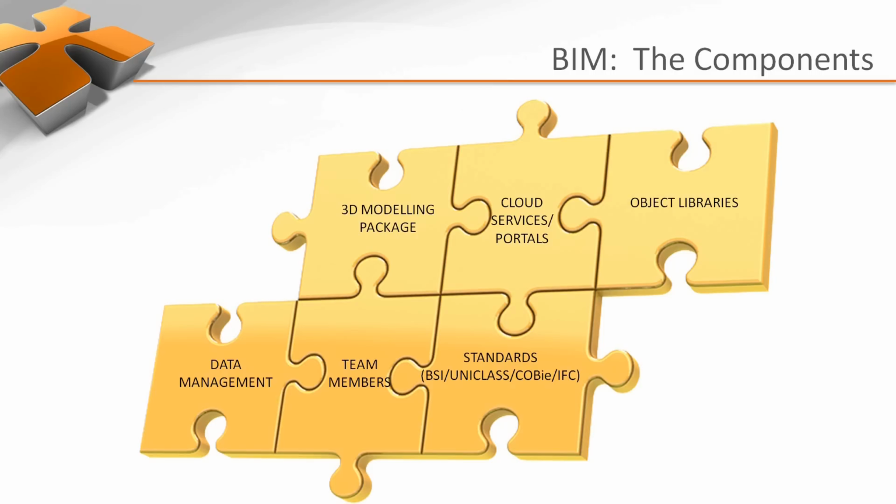I think the final thing to say is BIM is not just about the technology, it's much more about the process and the workflow and making that efficient and collaborative. And team members are very important, and I've seen increasingly now that on many larger projects there is a new function which is a BIM manager who's actually appointed to a project to make sure that the BIM strategy for that project is adopted correctly, and that the quality of the BIM information being provided is accurate and as expected.